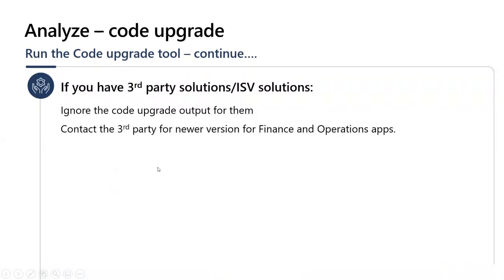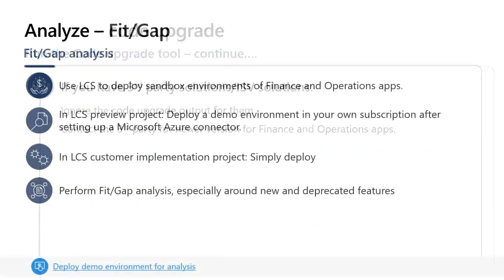During estimation, if you have any third-party or ISV solutions, make sure to ignore the output from the reporting for those. ISVs should not be manually upgraded — you need to contact the third parties for newer versions of those components.